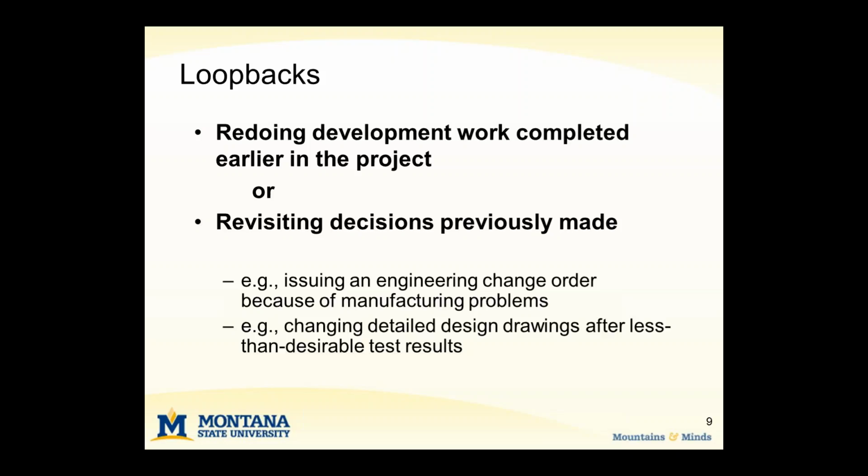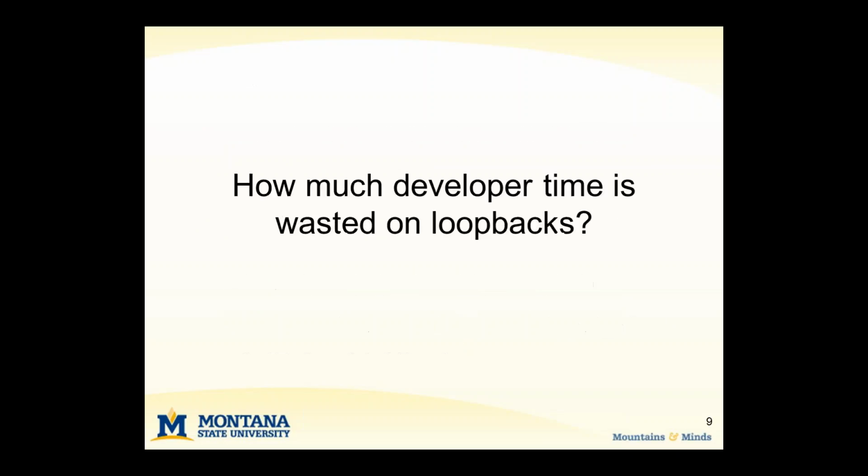So that's a loopback, and one thing that we have seen is that there does seem to be quite a bit of developer time spent on loopbacks. In fact, some of the companies we talk to, the number can get quite large. Some might estimate 30, 40% of time. We've had others that have estimated that it might be as much as 3/4 of a developer's development time is spent redoing work that they had already done previously. In other words, they're spending a lot of their time in these loopbacks.